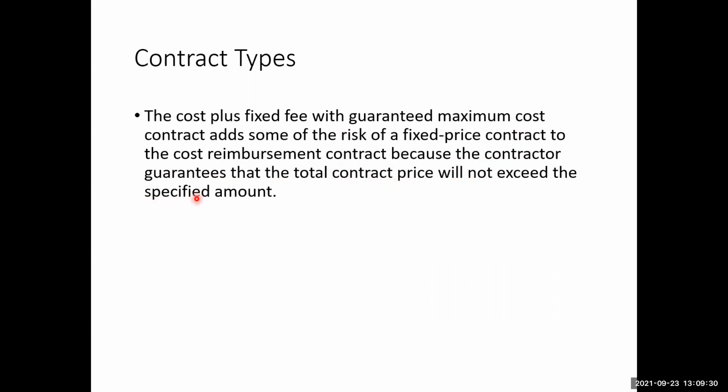As I have just said, if for a $100,000 contract the guaranteed maximum price is $120,000, and the cost increases beyond that, the contractor will only get the maximum amount plus the fixed fee, and will risk losing the fee if the cost increases too much.